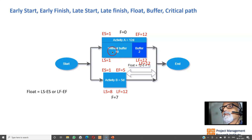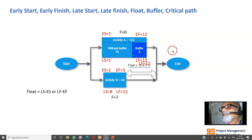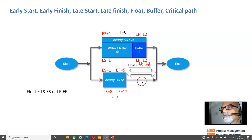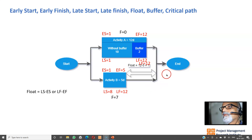If I start Activity A on day two, it will finish on the 13th day — meaning the project will slip. Whereas for Activity B, even if I start it on day 8, I can complete it on the 12th day. Since Activity A runs parallelly till the 12th day, starting B on day 8 will not cause the project to slip.